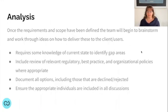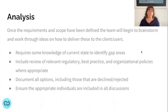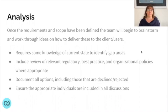Once you've completed requirements and have a defined scope, the team brainstorms and works through ideas on how to deliver the outcomes. In the analysis phase, you need to understand the current state to identify gaps and focus areas. Conduct a regulatory review — check for regulations, organizational policies, and best practice guidelines to incorporate. Document all options, including those that are rejected, for transparency and future reference. Make sure all appropriate stakeholders are included in these discussions.